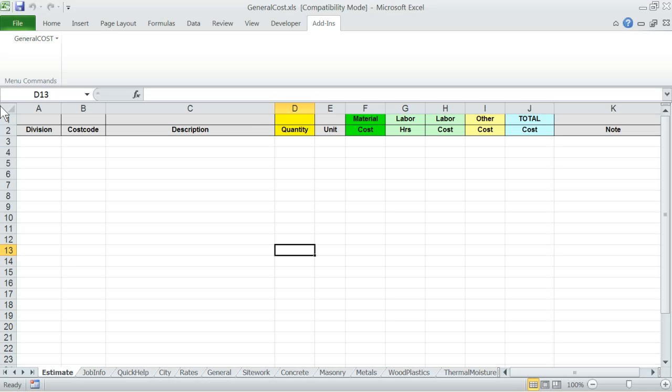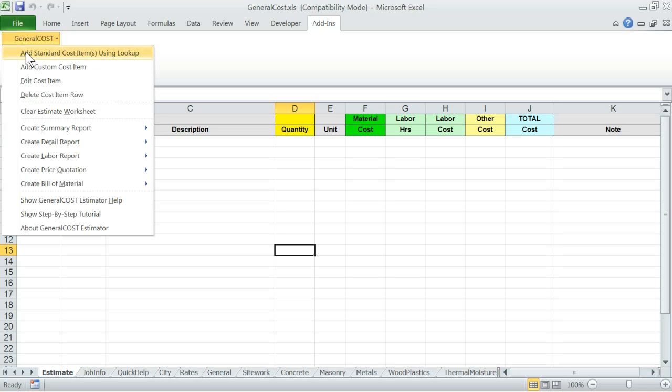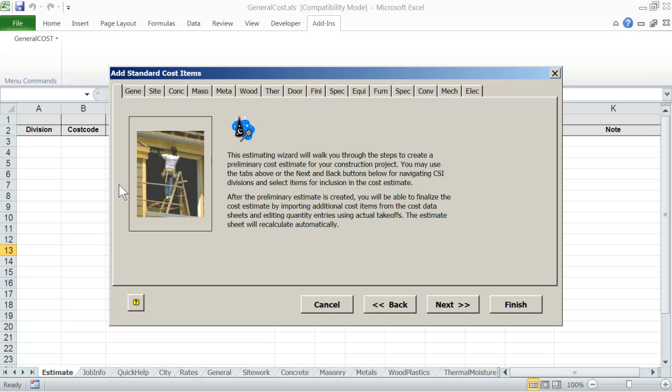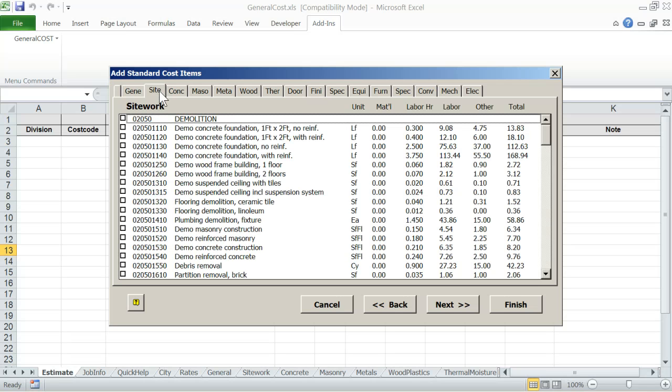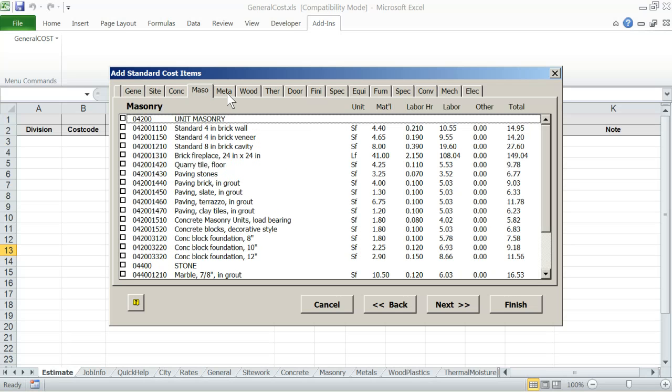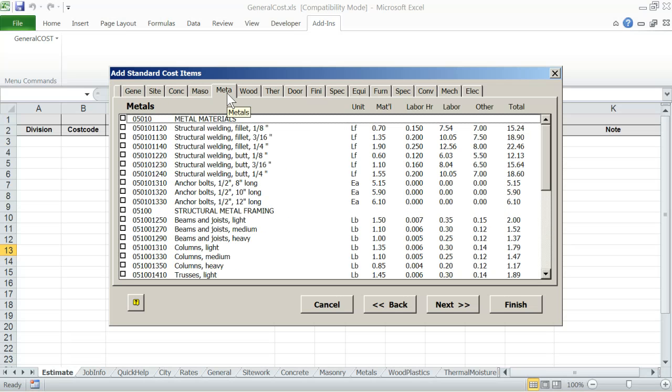The fastest way of starting to build an estimate is by using the add standard cost items using lookup from the general cost menu. When you click on it, general cost will open the lookup window with divisions identified on the top. You can click on any division and then click and select one or more cost item rows for inclusion in the estimate.